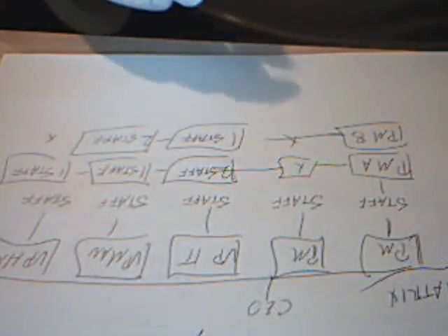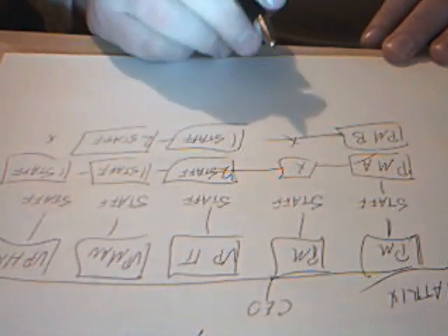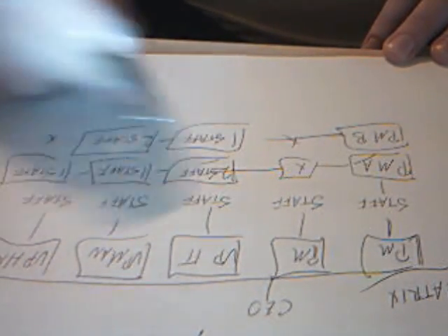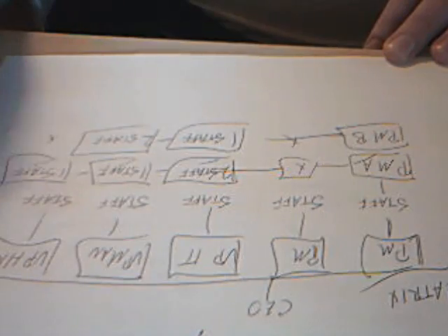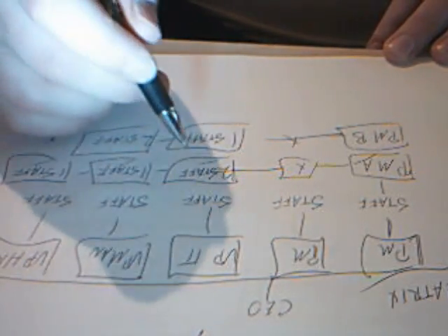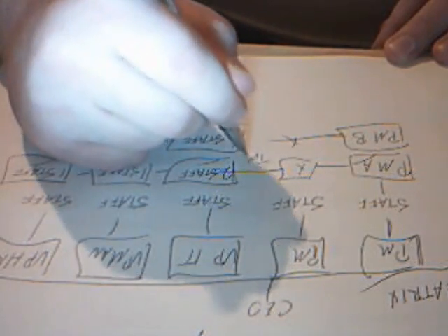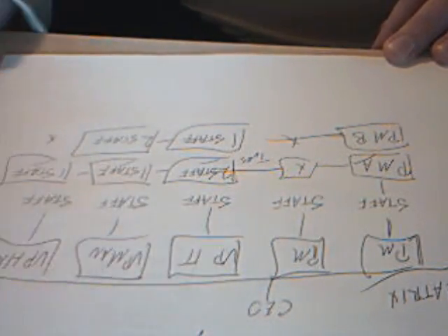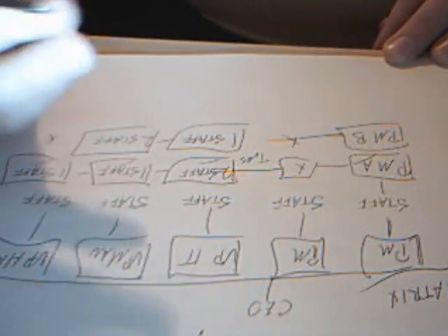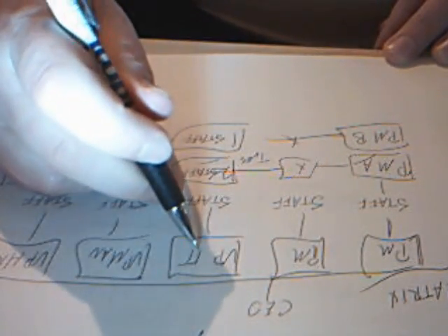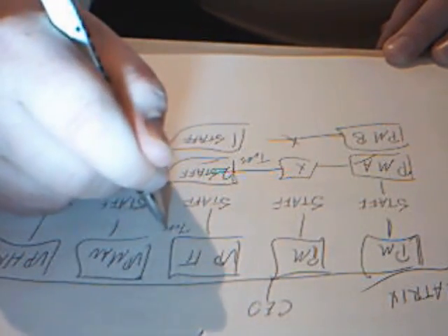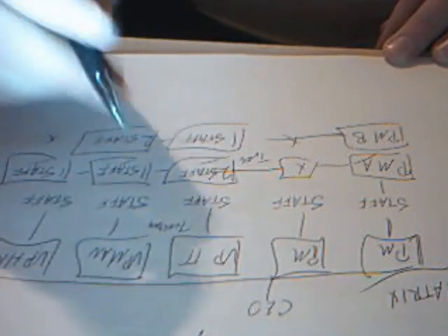But the biggest downfall to the matrix being successfully operated is, we've got project manager A here. He's got his two staff. He's got 2, 3, 4. He's got 4 people that work for him. All 4 of these people also work for someone else. So he's got a deadline of Tuesday that I need to have all these IT components up and running. I need to have this website running. Well, this guy says, hey, we're installing new hardware and I want it done by Tuesday. So we've got somewhat of a conflict.